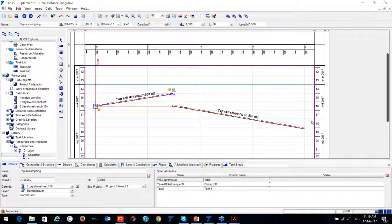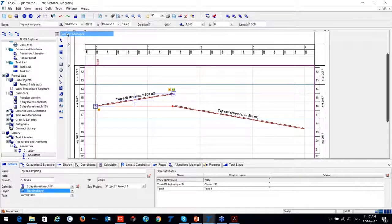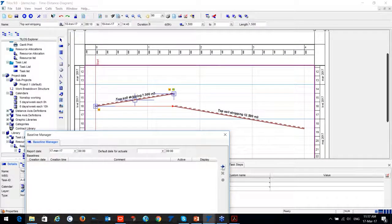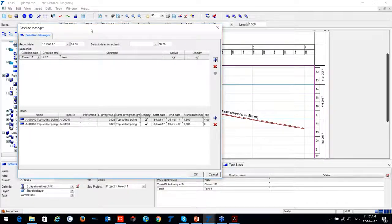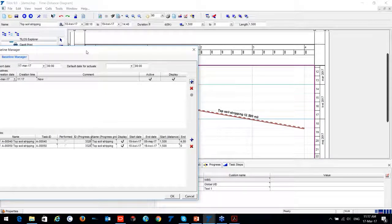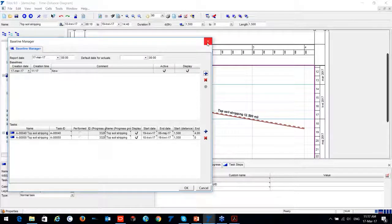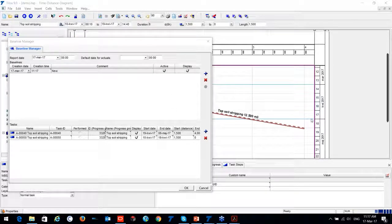Mr. Varender asked about handling 3,000 activities when updating and comparing plans with actuals. Once you have your baseline, export it to TILUS and save it as a baseline using the baseline manager — multiple baselines are supported. Later, whenever you enter progress in your CPM tool, just import again to TILUS and compare.